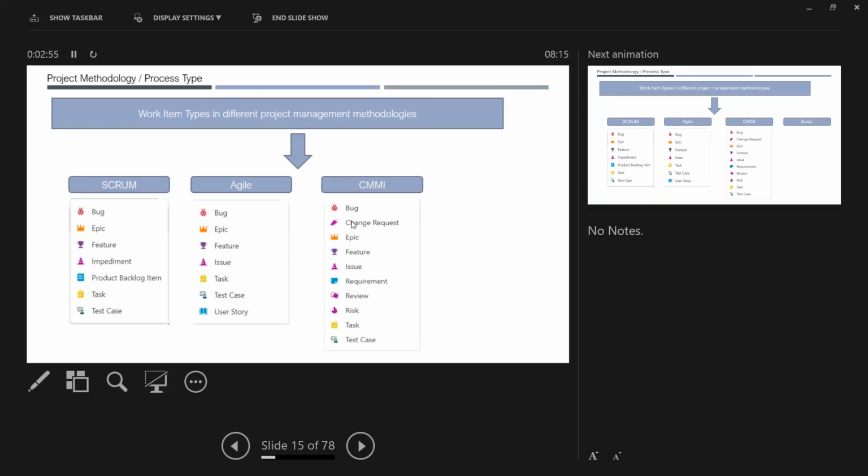Let's not get change management into day-to-day Scrum activities, because the moment you bring them in, you will spend more time in change management meetings or release management meetings, and less time on the actual work. That's why it has been separated from the agile methodologies.